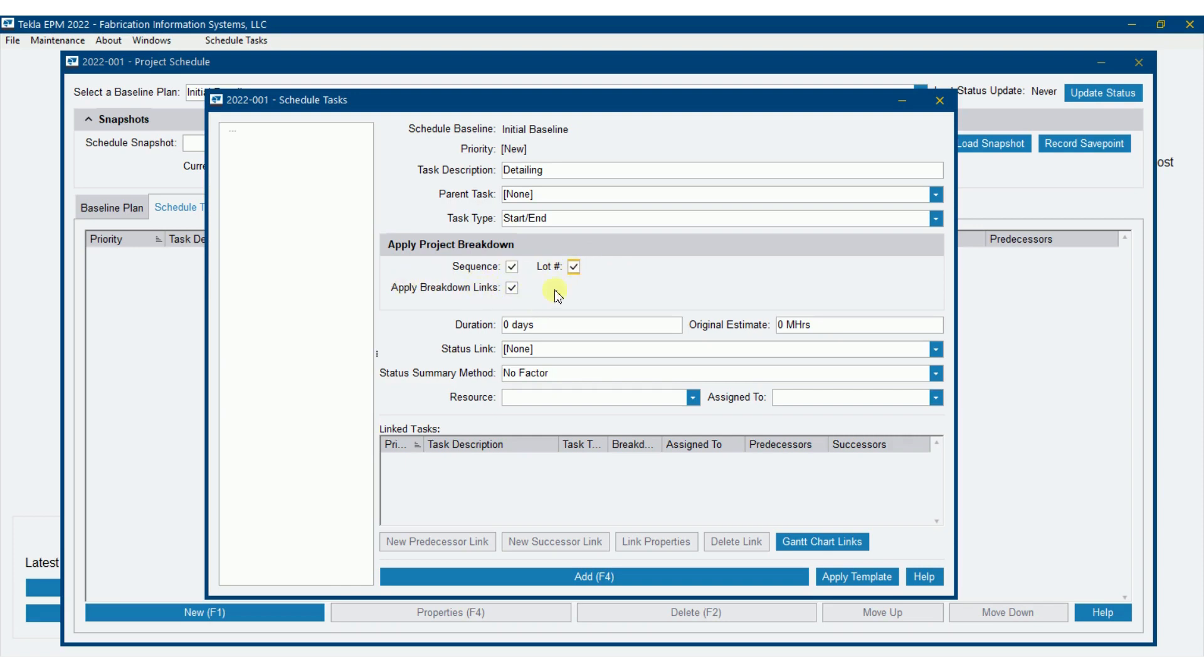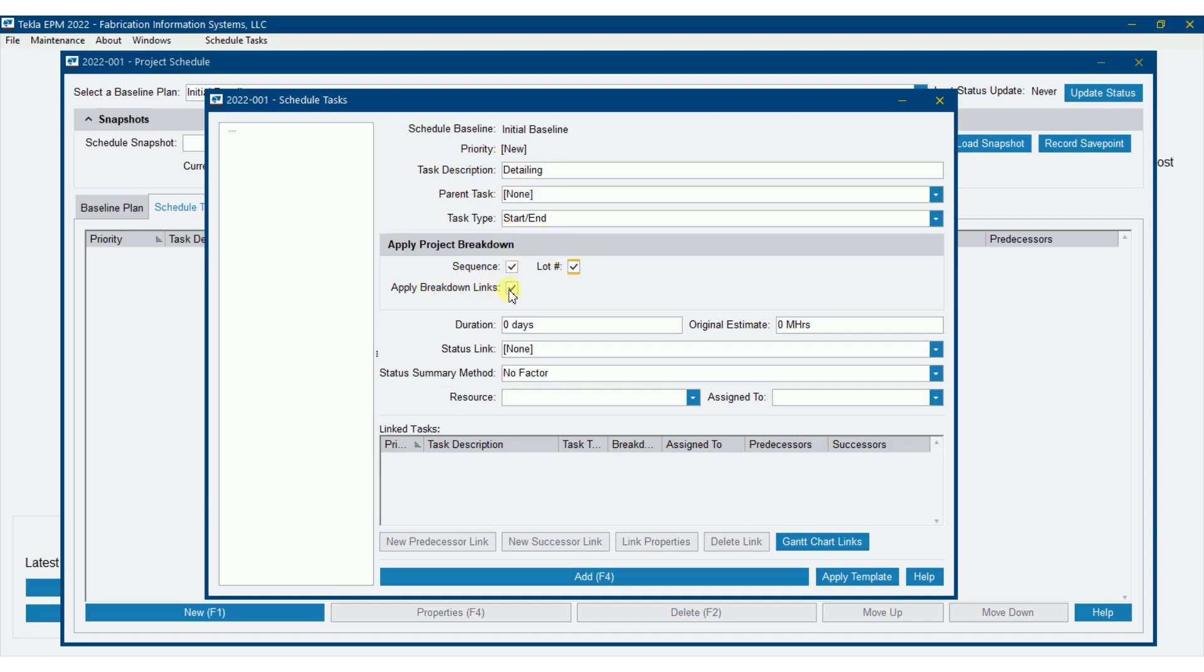And then apply breakdown links. So whenever we do a breakdown and say we put sequences in there, I can say that sequence one has to finish before sequence two will start. So that's a link there. I don't have to apply those links on every task, but we're going to go ahead and give ourselves the opportunity to do that here.